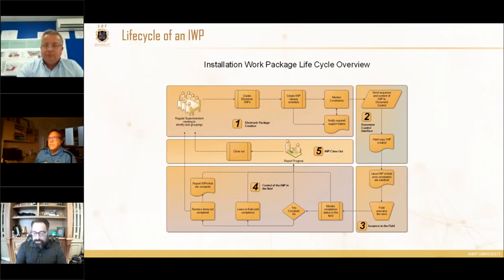Without constraints and constraint management, all you have is groupings of work. You don't have executable work. The real key is identifying what the work is in the installation work packages and bringing them forward to the craft after they've been fully constraint cleared.